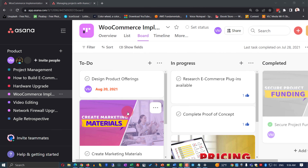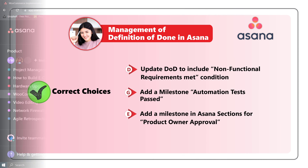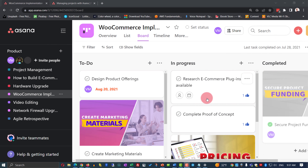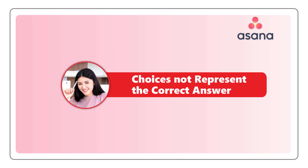Choice E — add a milestone in Asana sections for product owner approval — is a little bit different. For example, we are looking at a WooCommerce implementation project in Asana. It has three sections: To Do, In Progress, and Completed, in relevance to the tasks the team completes on the project. What Choice E suggests — adding a milestone in a section for product owner approval — would require us to add a new section in between In Progress and Completed, which would allow the product owner to approve items before they are marked completed.